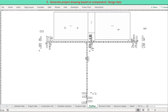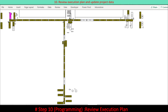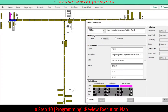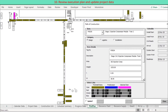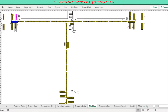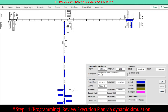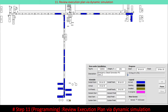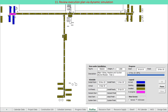Dynamic simulation is made possible according to the project schedule for path-of-execution review. In the execution review session, we can review and update project data referring to the project drawing. Execution sequence is reviewed, and project data including execution data are reviewed and updated to ensure alignment with the execution plan. Any anomalies or clashes are identified and suggestions for optimization are made.